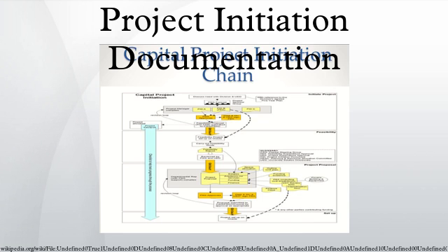The PID is not regularly updated during project stages. Any revisions or updates which are needed are done at the end of each stage in order to incorporate detailed milestones for the next steps. The project initiation document is the basis of decisions taken for the project, and there is nothing worse than the PID being queried at a later stage when no record has been kept of the reasons why PID changes were made.